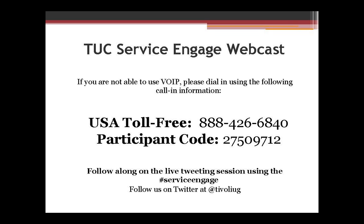Yeah, before Barlock starts, I just wanted to mention something. As Bill mentioned, our site's not translated, and we did that on purpose. We wanted to get something out the door really quickly, so the business decided it was okay to punt on translation and focus on higher priority things. So I guess the takeaway from that is you have to really figure out what's important to your business to succeed, and for our business, translation wasn't at the top of the list, but now it's at the top of the list. Right.